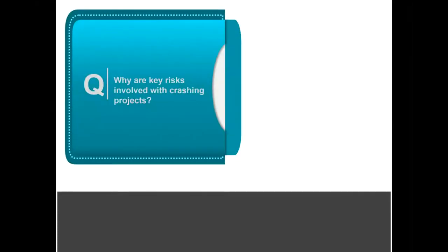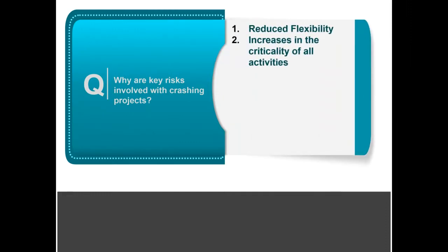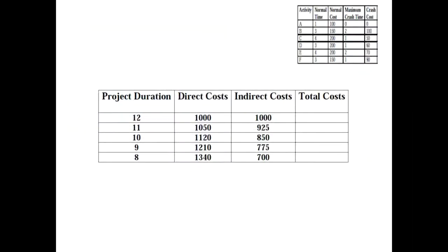Okay, so the prompt here is to reflect on what are the key risks involved with crashing projects. We have to be conscious that, first of all, it reduces the flexibility, so you have less float, and it increases the criticality of all the activities. Basically, your project becomes much more risky. So it's a fine balance between time and risk that a project manager has to consider.